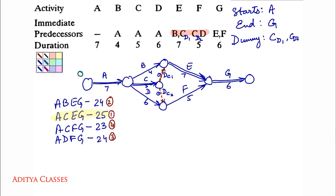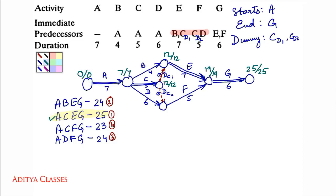First path: A, C, E, G. Starting at 0: 0 plus 7 gives 7; 7 plus 5 gives 12; 12 plus 0 gives 12; 12 plus 7 gives 19; 19 plus 6 gives 25. For the backward pass on the critical path, the critical durations are final: 25 minus 6 is 19; 19 minus 7 is 12; 12 minus 0 is 12; 12 minus 5 is 7; 7 minus 7 is 0.